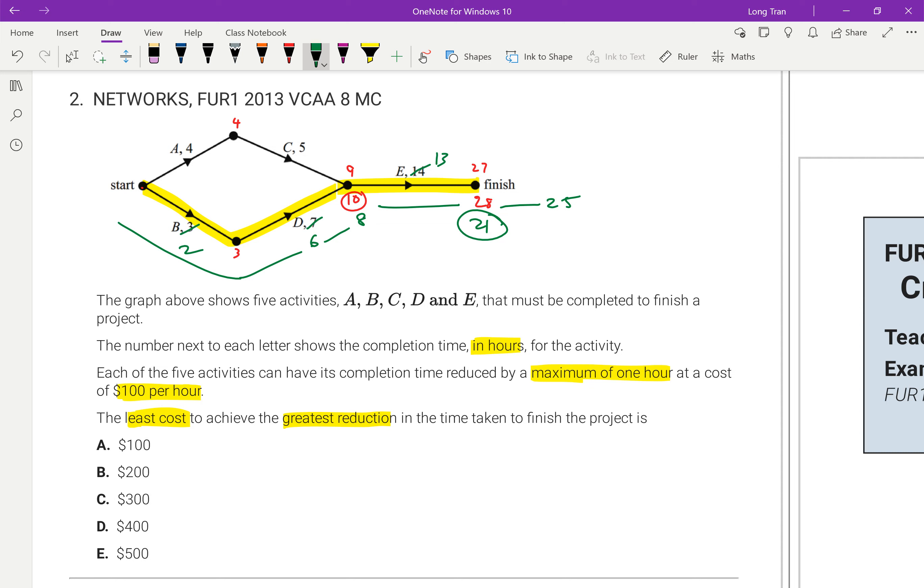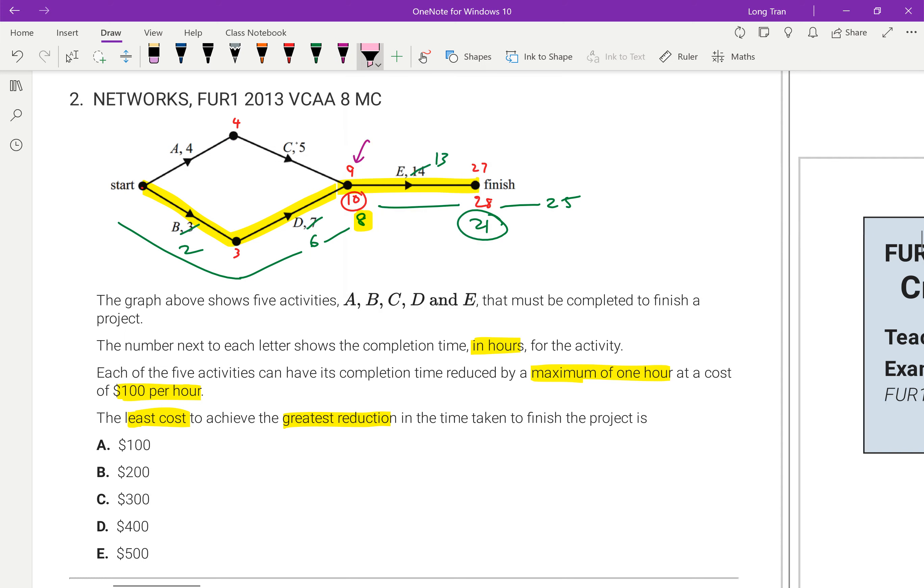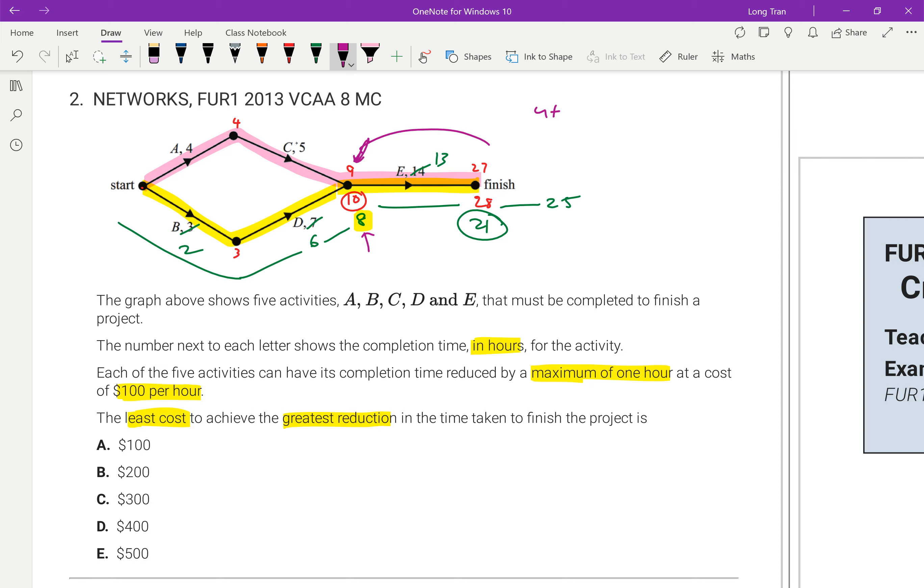But it's not because you have to now double check. Remember, the fact that I even got eight at this point, can you already see that this was a nine? That was like four plus the five gave me nine. So that would have became the new critical path, which would have been a problem. Because if that is nine, that means that even though I was able to reduce it down to eight, the nine still takes precedence because it's still going to take nine minutes before E can even start. So nine plus the 13 still gives me what? Nine plus 13 is 22. Still takes me 22.